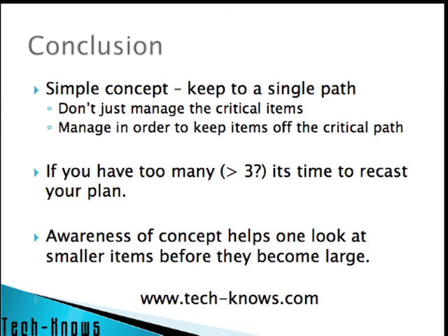Keep the small items off the critical path, so that the technical people can address what's currently the critical item, and if you as the project manager can focus on clearing everything else away that maybe can be done with some lesser skilled or outside staff, then you're going to increase your chances of bringing in your project on time.